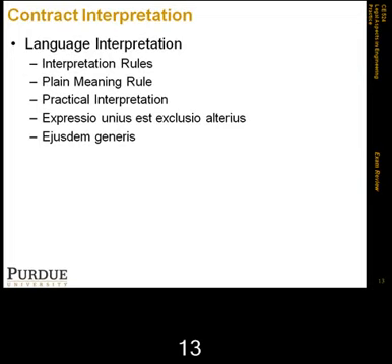The second one is ejusdem generis, which states that the meaning of a general term is limited by the specific illustrations that accompany it. So anything not specifically mentioned has to be of the same sort. If we say, for example, damages to crops, trees, and fences and premises, that does not include damages such as depreciation of the market value of something. That's the example we use there, because it's too unrelated.